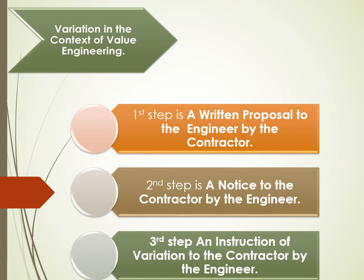If the proposal includes a change in the design part of the permanent works, the cost of the design is to be covered by the Contractor. Subclause 4.1 Contractor's General Obligations is to apply.